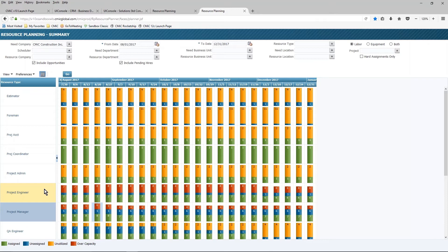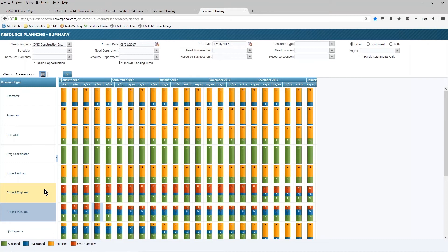Where you're starting to see potential problems are the yellow bars and the red bars. The yellow bars indicate that I have people with a particular set of skills, and I have no requirements or needs to assign them to, and the red bars represent a situation where I have more needs than I have people.